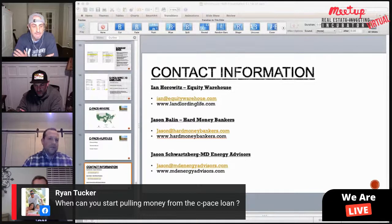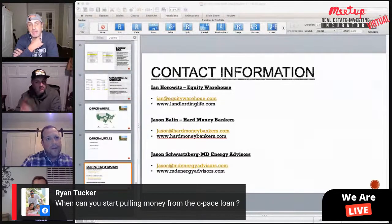Yeah, just like you said, we're going to want the lien waivers and to know that the work has been done. And yes, as soon as it comes in, we're doing some pretty big transactions, and we usually run pari passu with the bank. We can rely on their inspections and so forth in order to get the funds in the hands of the owner. And does interest only accrue on dispersed work?